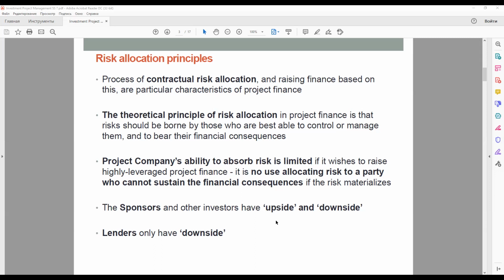On the other hand, transferring all risk away from the project company to other parties is not viable if other parties are asked to assume too much of the risk. They also expect the appropriate equity return for doing so, with obvious consequences for investors in the project company. So you have to balance this distribution of risk that will be left on the project company and transferred to the other parties.